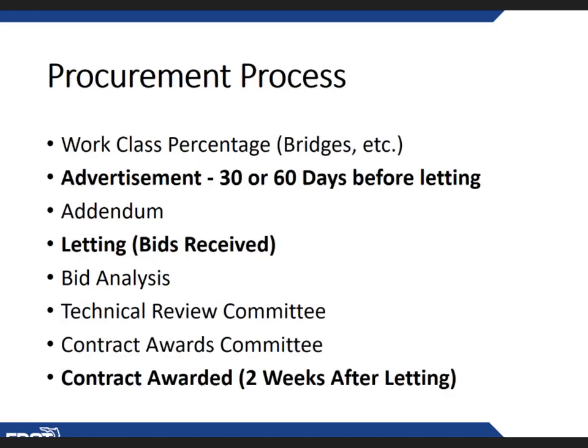So it's not that we can't give you a statewide generic price, but if you want something for your project, we need to know what's in your plans and specs. And that goes right into the procurement process. During this time, the district plans review section, they're reviewing the complete deliverable to make sure the project is ready to advertise. Projects are advertised for 30 or 60 days as determined by different criteria.